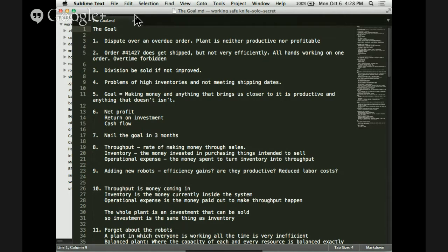That is common. The amount of time a person will take to finish a particular job in your Kanban chart, in your work item chart, will vary over time. The same person, same item might take a different amount of time next time. So your predictability gets impacted. Predictability of output that you give to your customer gets impacted, because you don't know exactly how much time it will take, because these are people, they're not machines. And even in the case of machines, it varies. There is always statistical deviation. You will run into it. It's a fact of life. So now I'll give you an example.